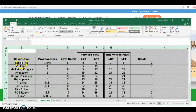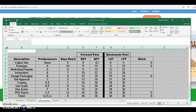So if you start here with the first activity, this starts at time zero or time one — it really doesn't matter in this case — and it takes five days, so it finishes after day five. We can look at the next two activities, prototyping and marketing program, based on the fact that A is a predecessor. Since A finishes on day five, these can start on day five. This has a 10-day duration so it finishes at day 15; this has an eight-day duration, it finishes at day 13.